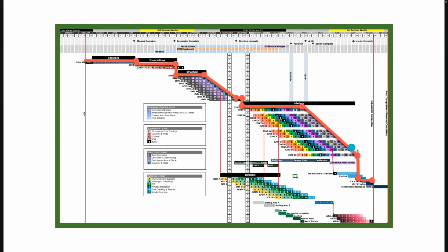You have the line of balance of every phase, which essentially tells you the speed that the train is going. And because we have a mathematical relationship, we are able to track what is called the realized flow potential. So we know the ranges that you have to be in for your train speed in order for us to be delivering a really good product for our customer. At the end of phases, you have buffers like we've already talked about, and then you have interconnections, you have interdependence ties. Linking these together is what creates your path of critical flow.